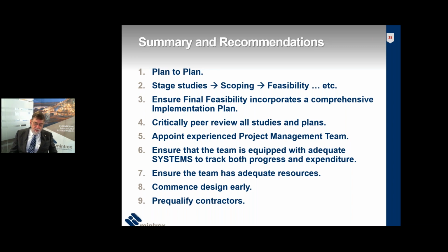Operational readiness is one that particularly comes to mind because the quality of the operational team and the quality of the planning for that team to take over from the project initiation and construction team will have an absolutely huge impact on the project outcome.